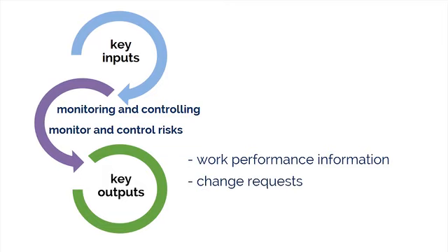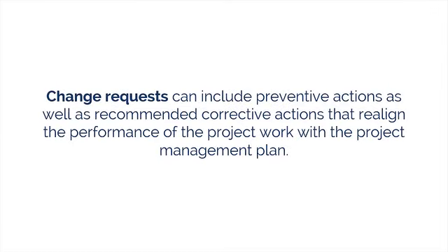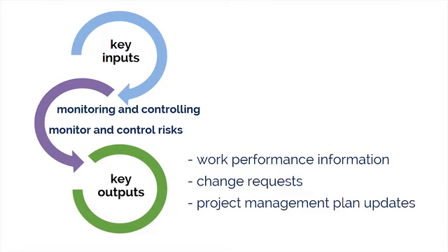Change requests. Remember that these are prepared and submitted to the Perform Integrated Change Control process of the Project Integration Management Knowledge Area. Change requests can include preventive actions as well as recommended corrective actions that realign the performance of the project work with the project management plan, which leads, of course, to project management plan updates. Sometimes changes made on the project have an impact on the risk management processes, and this will need to be reflected in the risk management plan.